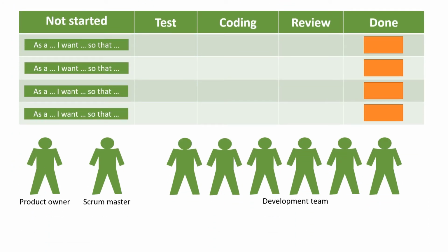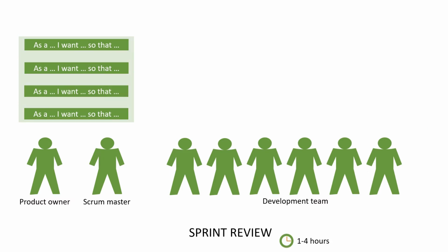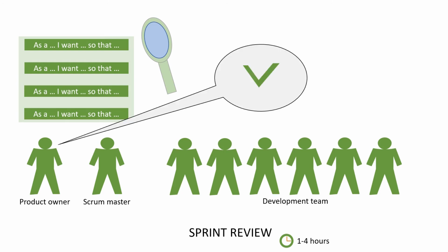At the end of the sprint, all done user stories are proposed to the product owner as the product increment. This is reviewed in another meeting called the sprint review. Each proposed story is demonstrated. The team discusses in particular how the story meets the definition of done. The product owner may accept or reject the story. A rejection should be very rare and not a surprise, as it happens only when the development team and the product owner diverge in their appreciation of these criteria. This should be identified earlier in the sprint.